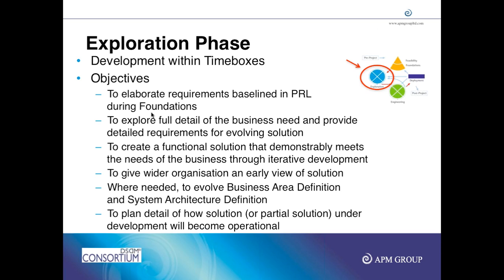increments, and we have each release divided into time boxes. So if my project is 6 months, to develop a website that offers online sale of products, I divide my project into 3 increments. You can also call them releases.